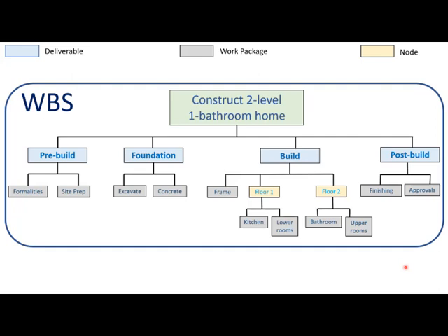For example, many users of Microsoft Project refer to the activities entered in Microsoft Project as constituting the WBS, and that, strictly speaking, is not quite right. The WBS, in its purest conceptual sense, is high level and is intended to assure the project manager and the project team that all major categories of work have been identified at a high level, not at the most detailed and granular level.